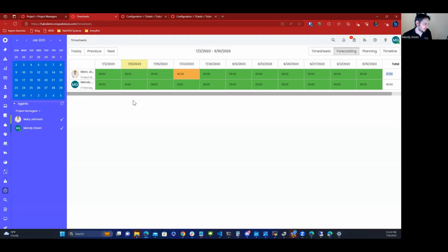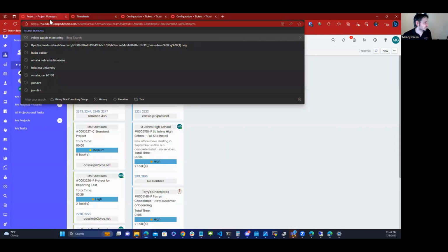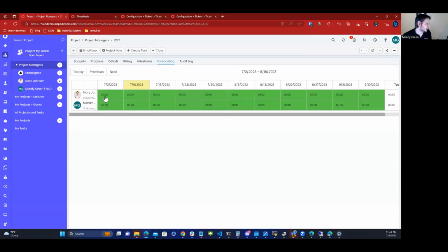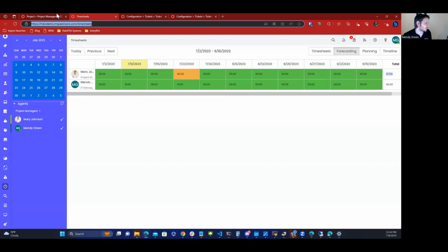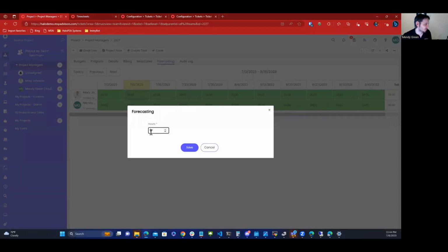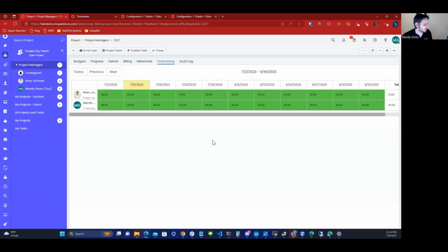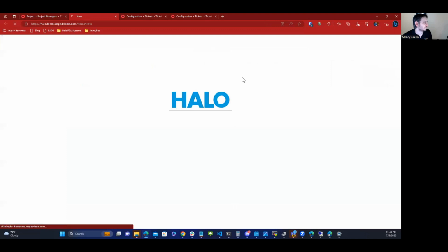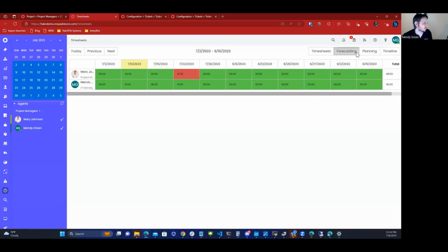And what happens if we were to give Mary some more time? What does that cell look like? So let's go back to the projects and let's go pick another project here. And let's go to forecasting and assign Mary. What week was that? That was the week of the 23rd. For the 23rd, let's give her just 1 hour here. Save. Okay, so now she has 1 hour here. And let's just refresh this page. And now it's red. You are over time.